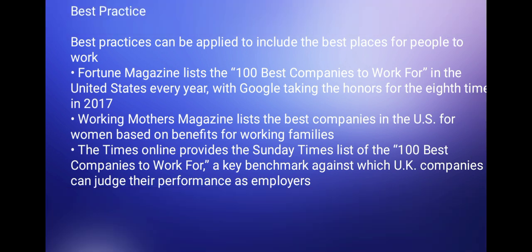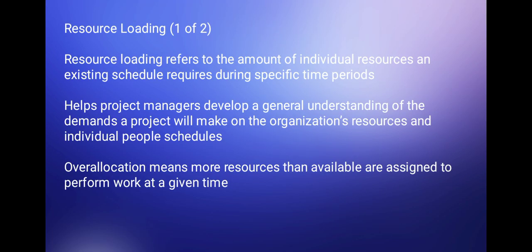Next is resource loading 102. Resource loading refers to the amount of individual resources an existing schedule requires during specific time periods. Helps project managers develop a general understanding of demands a project will make on the organization's resources and individual people's schedules. Over allocation means more resources than available are assigned to perform work at a given time.